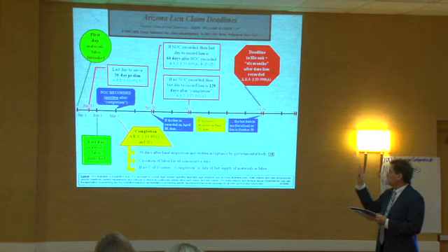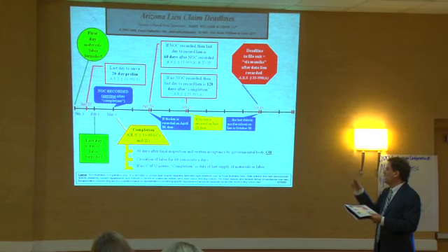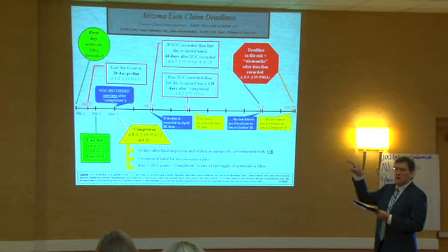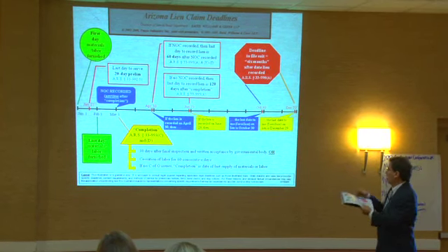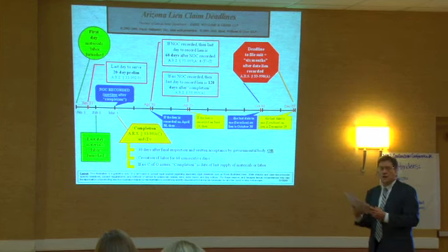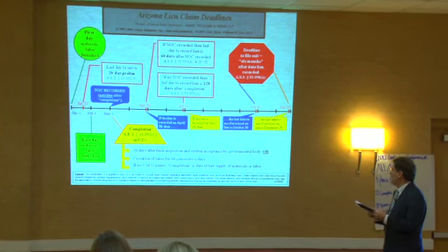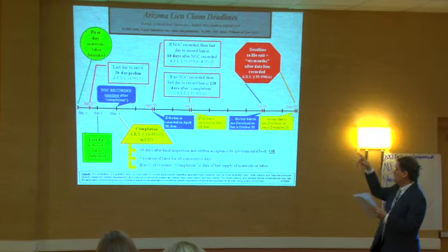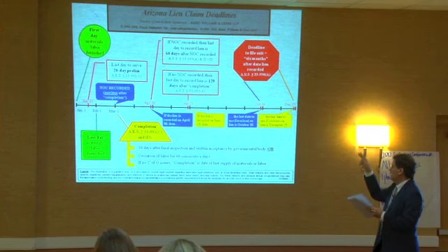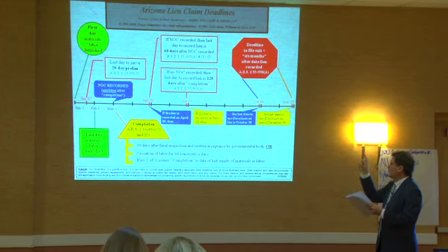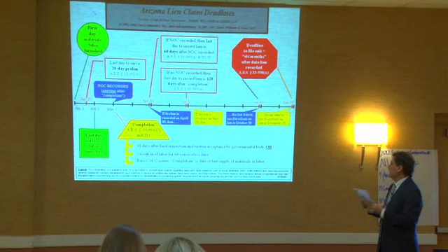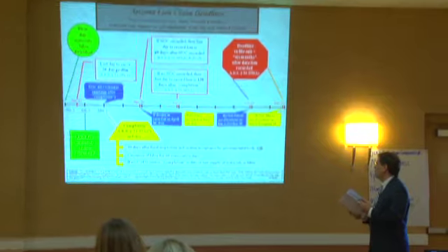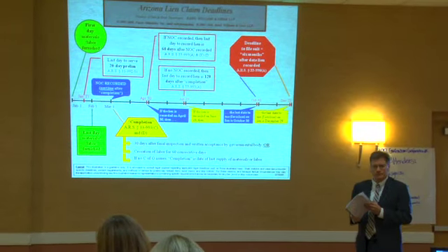If no notice of completion was recorded, then you had until June 29th to record your lien claim, because under this hypothetical, March 1st was the actual date of completion. In that instance, you've got 6 months from June 29th to sue on your lien claim, and that is December 29th. The suit date is 6 months to October 30th from April 30th, if an NOC is recorded, and 6 months from June 29th, if no NOC is recorded, and that's December 29th as your last date to sue.